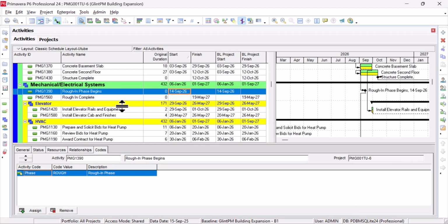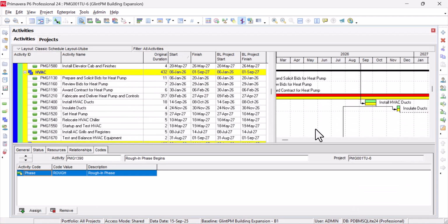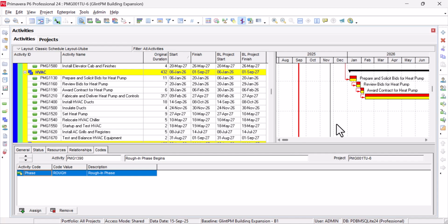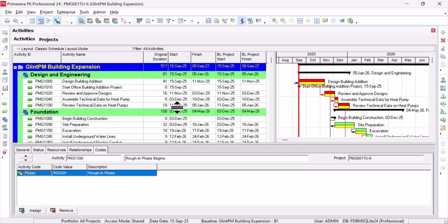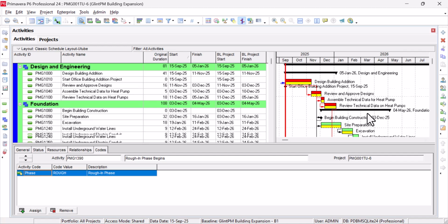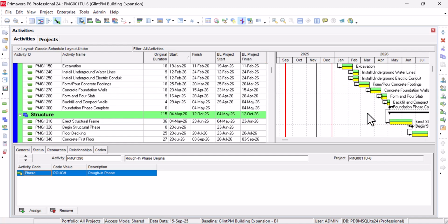So you have to baseline it before you start updating it. And after you baseline it, do not make a copy. Do not tamper with it. As you're updating, you just leave that schedule like that. So if you want to make any copy or backup, everything, do it before you baseline it. Okay, I think that one is clear.